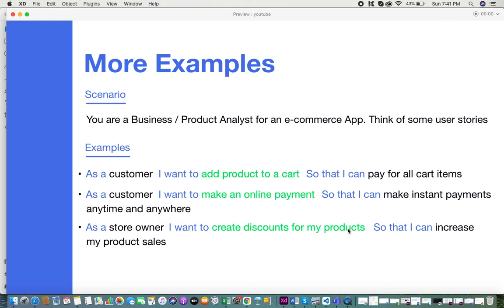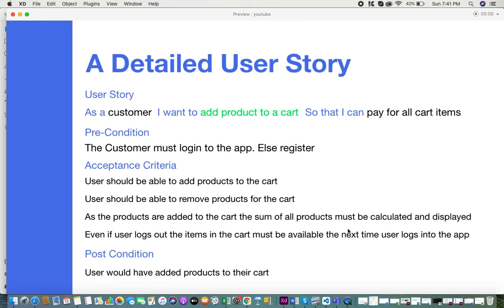Apart from this, you can define your user stories in more detail, which is usually done further in the project when you hand it off to development. A detailed user story could look like this: first, the base user story — 'as a customer, I want to add products to a cart so that I can pay for all cart items.' Second is a precondition: what the user must do before performing the task. In this case, the customer must log into the app, or if they don't have an account, they should first register.